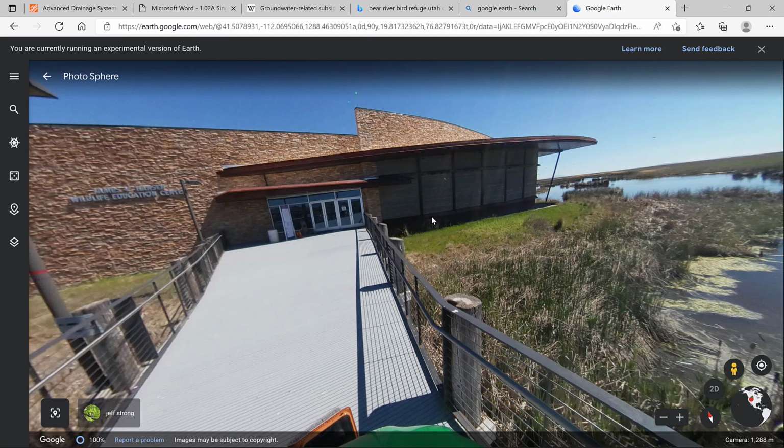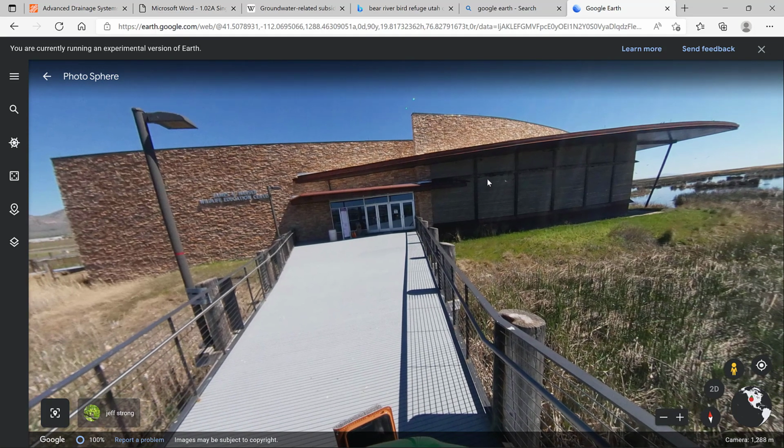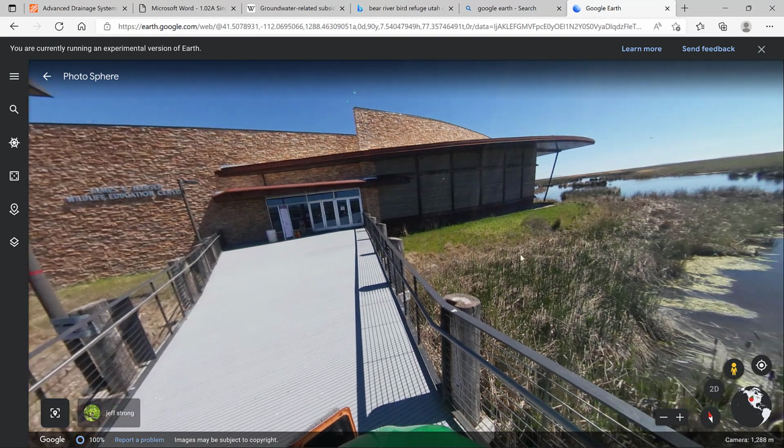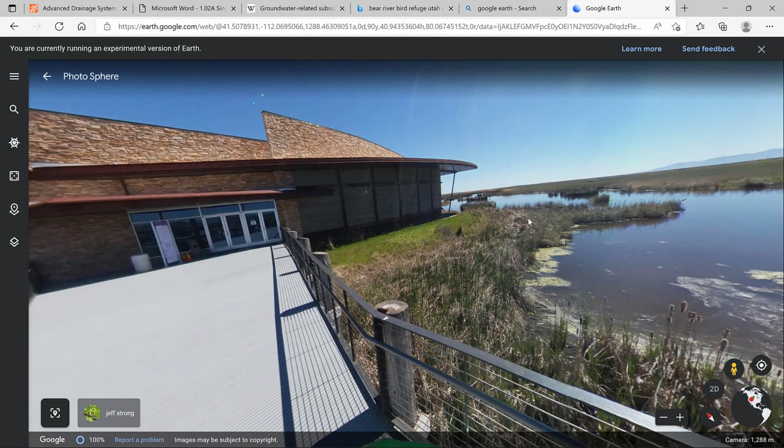But I remember a couple things that I was really surprised about, and let me share the experience. So one was we were doing construction, and the pump that we had dewatering the system ended up getting really corroded, because this is kind of like a salt marsh almost, and so the pump just got eaten up. It was brand new when we bought it. I remember pulling it out of the temporary riser, and it looked like it was 70 years old. It was all corroded and rusted, and it died one day.